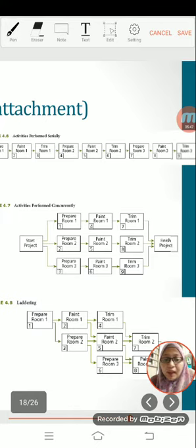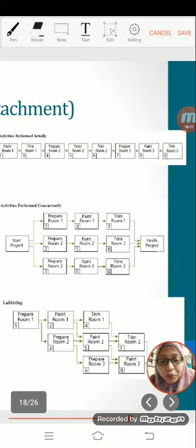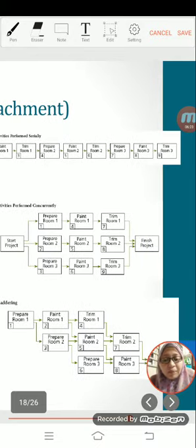While the bottom figure shows a technique known as laddering. Laddering is an approach that allows the project to be completed in the shortest time possible while making the best use of available resources. In figure number 1, you use only 1 person at one time. In figure 2, you need to use 3 different persons at one time. For figure number 3, on the first day, you use 1 person.